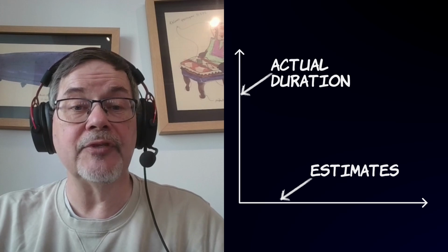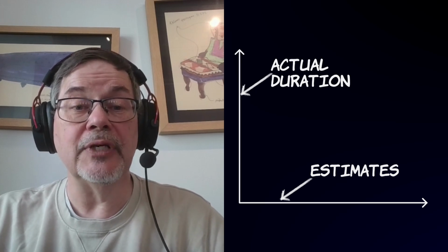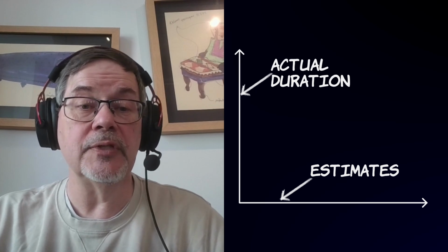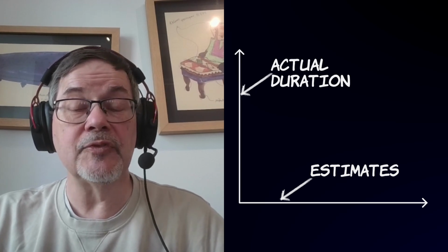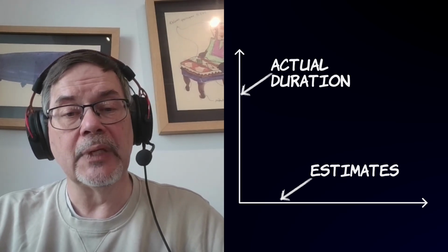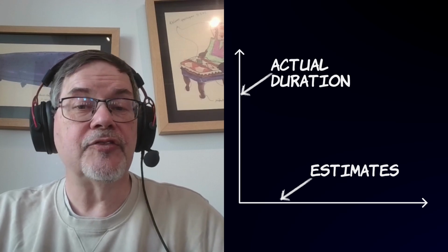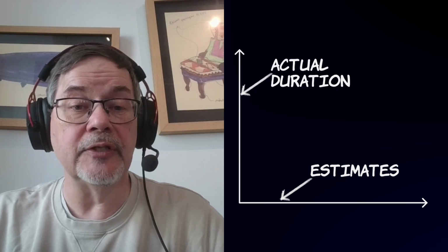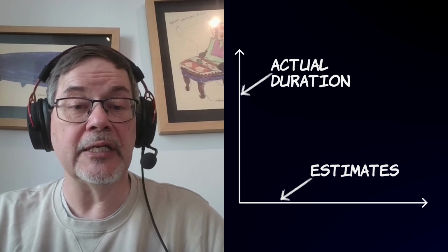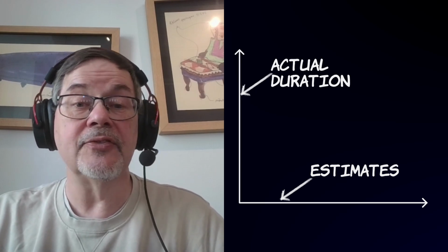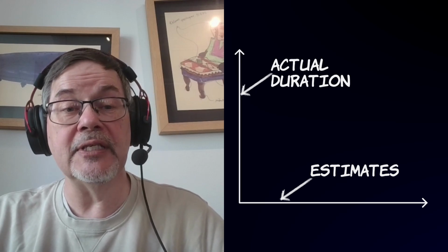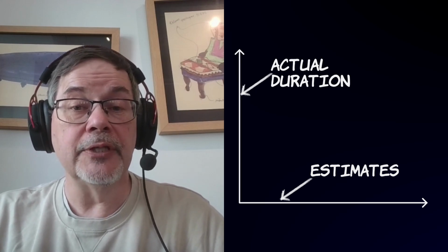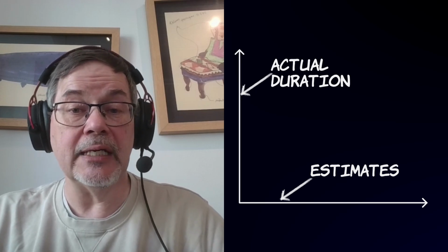Now, this is called a scatter plot, and you can easily create it in Excel or whatever business intelligence software your company is using. In this demonstration, I'll go with Excel. So, we can extract the data we need from Jira or Azure DevOps or almost any other project management or lifecycle management system. And the easiest thing is usually to do it as CSV files, comma-separated value files, because we can import those into Excel.